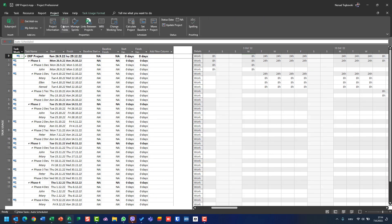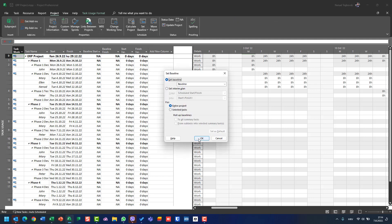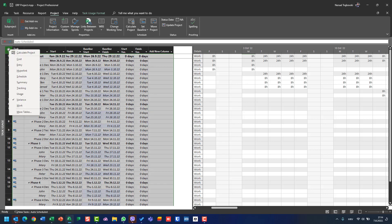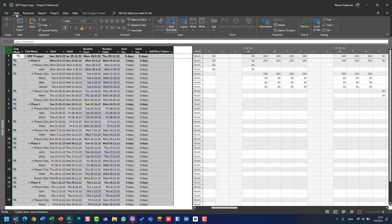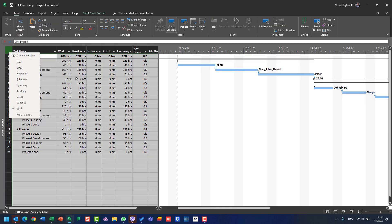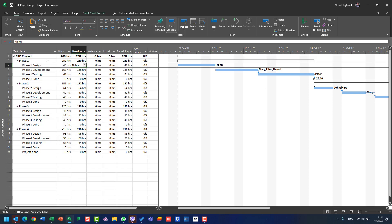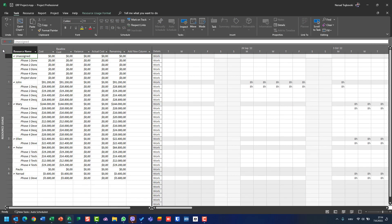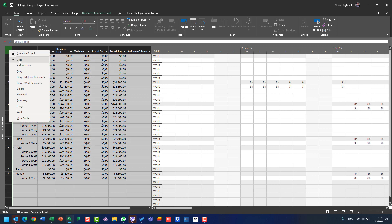If I go to Gantt Chart view, I am looking at the Work table — you can see the baseline here. And for the third view, Resource Usage view, I am looking at the Cost table. So each view independently remembers which table is applied to it.